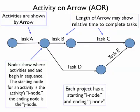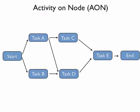Each project using the activity on arrow diagramming technique will have a starting I node and an ending J node. This technique was used a lot, especially in software planning, but it's not used quite as much anymore. The dominant technique now seems to be the activity on node, so let's explore that in more detail.